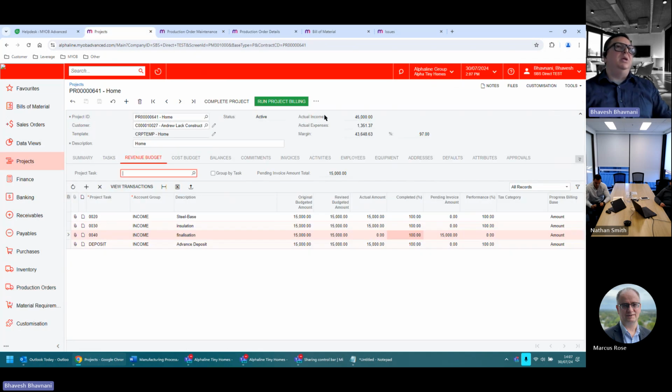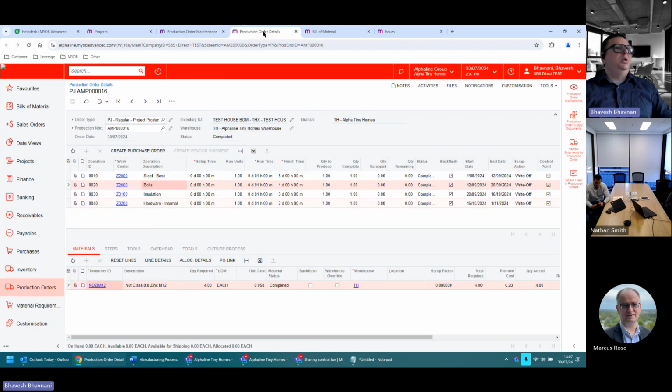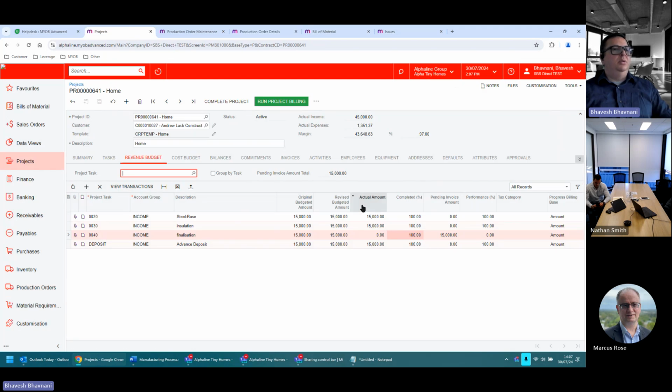So the only way to do this is to ensure that whenever we create the project task, it is equal to the operation task, if I want to automate this update. If I'm happy to keep this manual, then I don't care about what this task says. If you want to automate it, right? Yes. Otherwise, it can be whatever it wants, and then they will have to manually just say 100% over here.